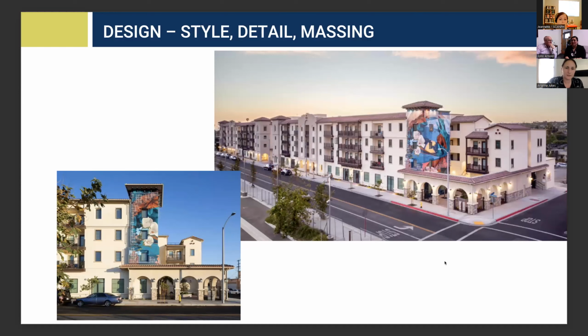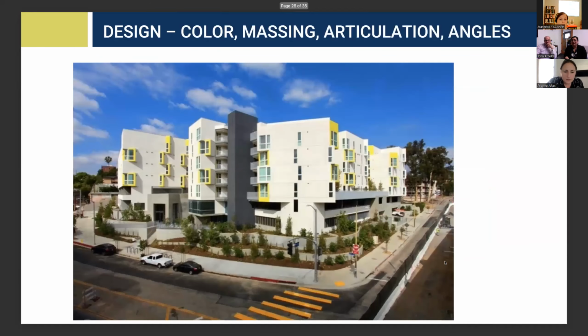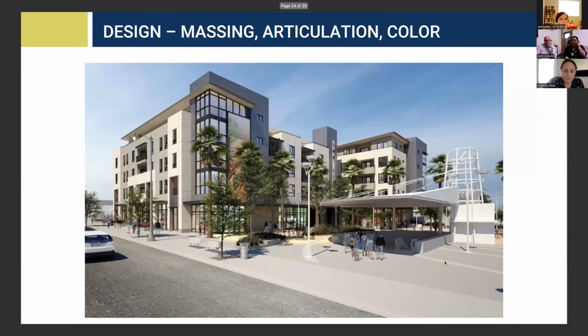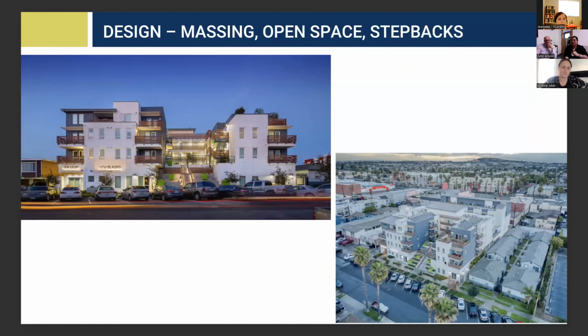If you're going to go subterranean, it works out to be $60,000 per stall, and that's super expensive. So if you can find a way to have your building have at-grade parking, that's a huge savings for sure. And also, like now with the current